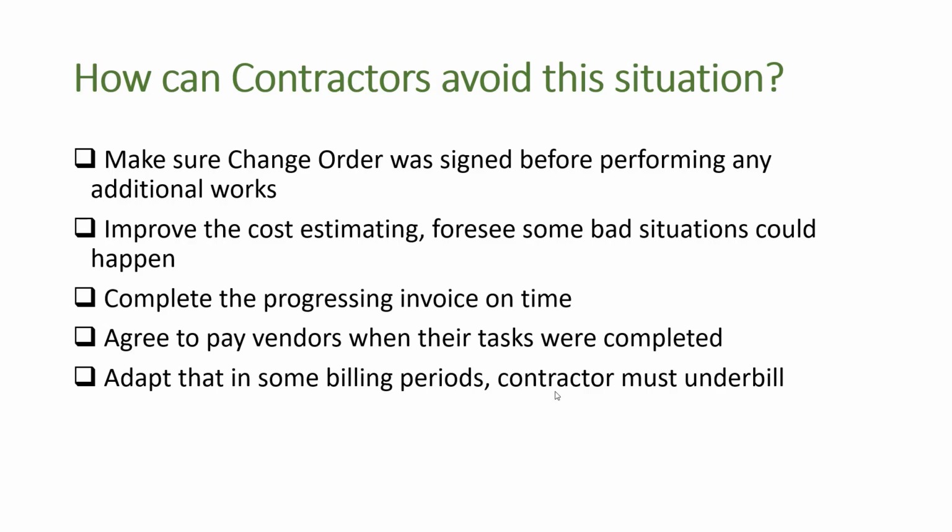With a good accounting system, you can do forecasting. You can estimate. You will get better at estimating your project, so you don't underestimate your project. And also, with a good accounting system in place, you will create invoices ahead of time. You can remind the client. You can pretty much be on top of your invoicing. Okay. Also, we don't agree to pay our vendor until all the tasks are complete. Double check on the vendor, because vendors often will also want to get their bill paid as well, but the job is not necessarily completed yet. So double check on the job, make sure it's completed before we pay our vendor.